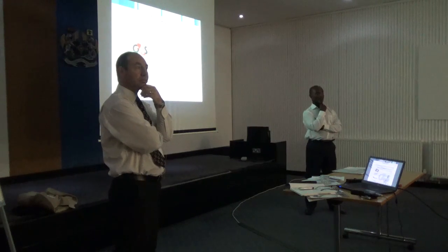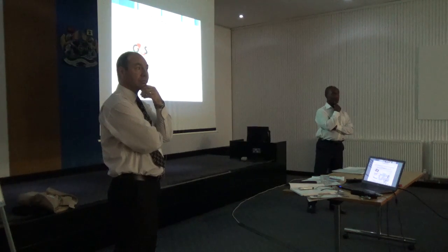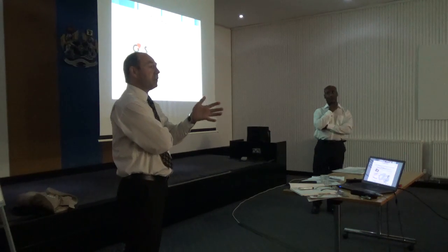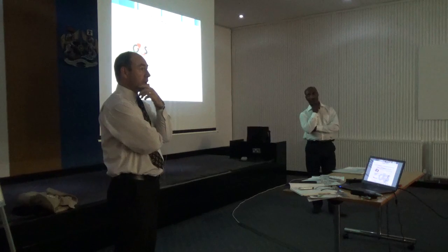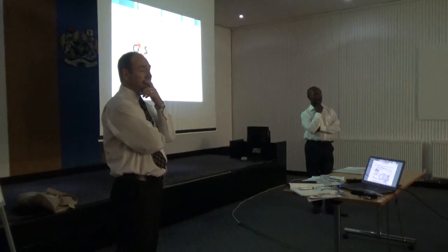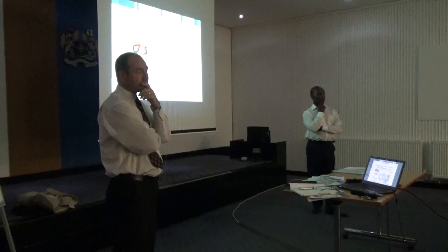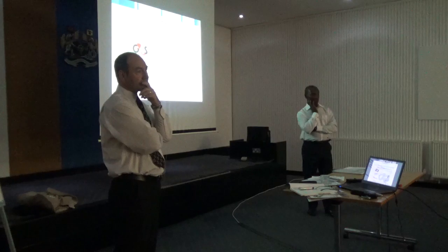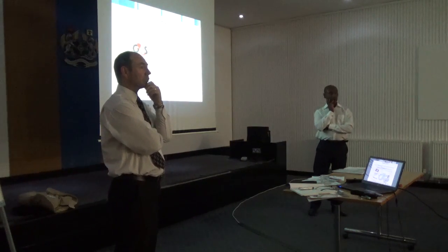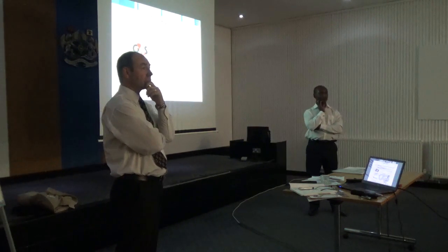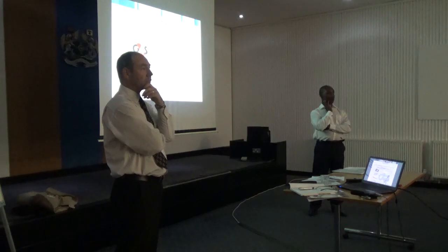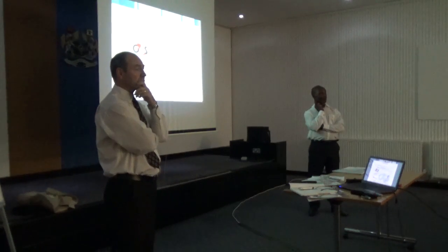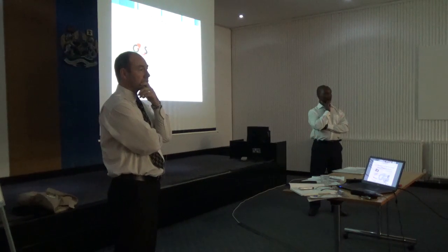I think one important point just picking up there, designers don't necessarily select equipment. Contractors select equipment based on cost. Again, depending on, yes, on a D&B specifically, you're absolutely right. Not just D&B. Most designers generally are pointed to RIBA stage 4A. It doesn't necessarily include supply chain integration. And that's probably the biggest problem. And that's where you can lose a lot of money on FM if you buy a lesser quality. But there's no incentive set by clients to go down the FM route of making it, you know.